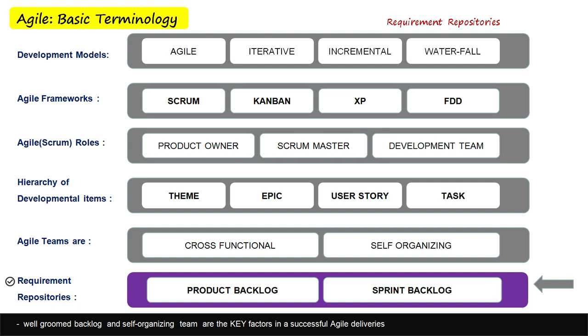The product owner is the one who is responsible for adding, updating, prioritizing and also managing the items in the product backlog. He is the owner of that. With the help of the team, he gets the details and also does the grooming of backlog items. The product owner is the final authority to insert, update, delete or make any modifications to the requirement items in the product backlog.